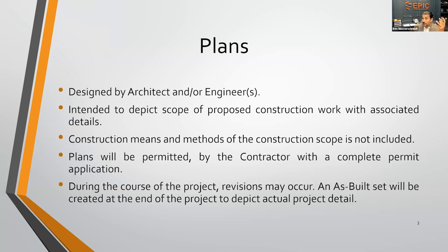It makes it easier, quite frankly, and a lot of times a spec book, what it used to be, is really just referencing certain standards, which is very simple to do on 1 or 2 or 3 plan sheets on the actual permitted plan set. So the contractor is going to pull for permit with the authority having jurisdiction, usually going to be the city, town, what have you.